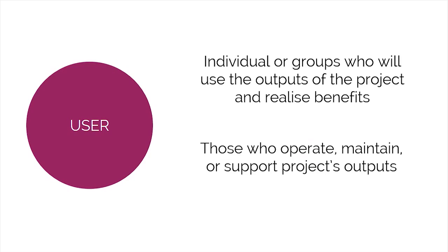User viewpoints should represent people who will be impacted by the outputs of the project. For instance, if the sale of mobile phones affects the market for associated mobile accessories, then the firms manufacturing mobile accessories are also users. In PRINCE2, the user's interests on the project board are typically represented by a senior user.